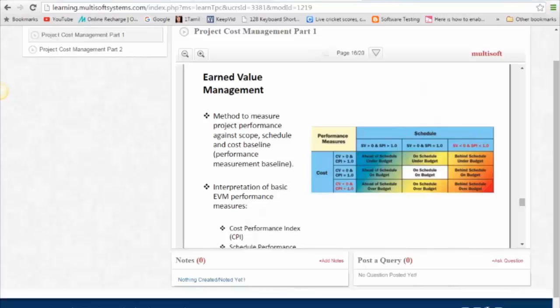Actually only 30%, although 5 days are over and 50% of time is over. The actual work, actual effort that has been spent is only 30%. Say, this is an example, let's say that is 30%. So EV is equal to actual percentage complete into BAC. So 30% into 100, which is 30, say $30. So now we have PV. We were given total time. We were given BAC. We found out EV and PV.